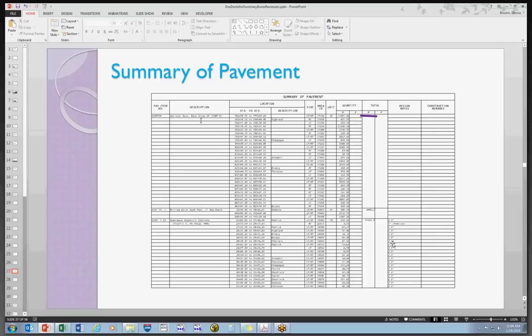And this lift over here is the same ad hoc, when they automate this sheet, this is the same ad hoc that is actually used in the calculation for that area. So it grabs the area, it uses this number in the formula to get this quantity. And hopefully that makes sense, because you won't be getting those pretty pictures anymore.